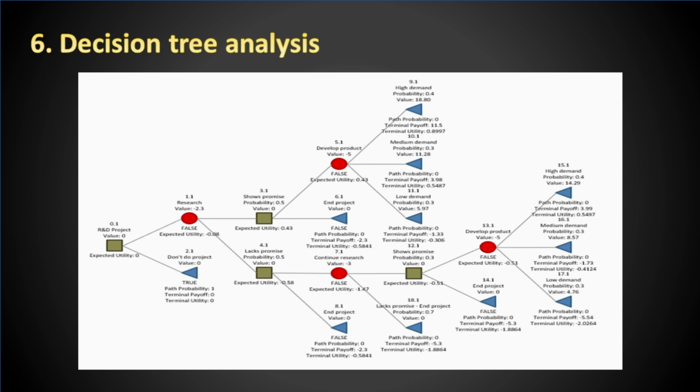Decision tree analysis. This is a data analysis technique that is used to find the best among several alternative scenarios. Best in terms of meeting project objectives. The most effective decision path is calculated based on the expected monetary value of each of the paths, and the one with the most net path value will be chosen.